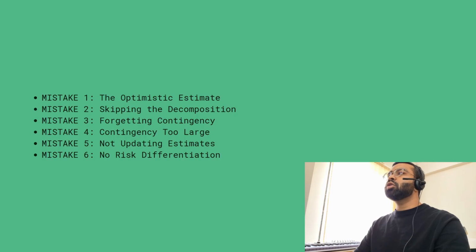The problem, you estimated best case scenario, not realistic scenario. Better, identify your assumptions. This assumes data is available week 1, zero major bugs, and client response to decisions within 24 hours. When those assumptions break, and they will, you have runway.